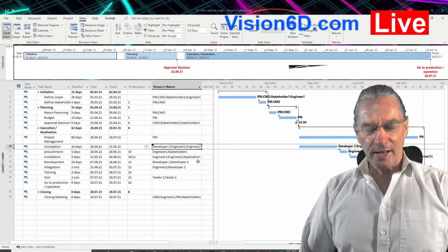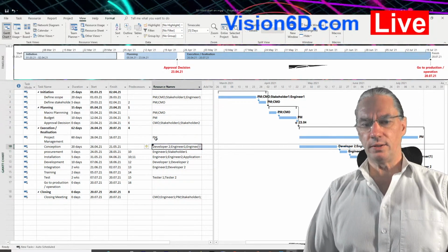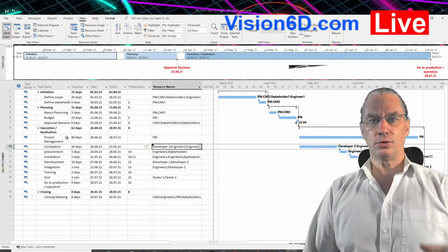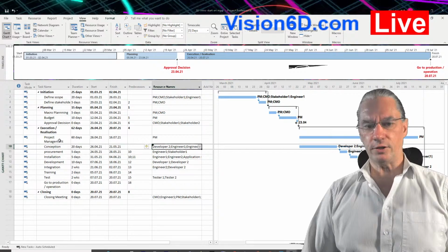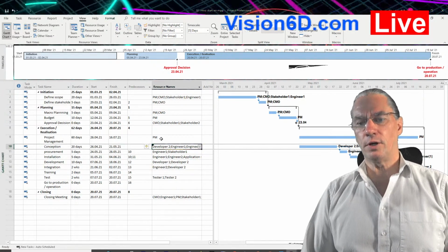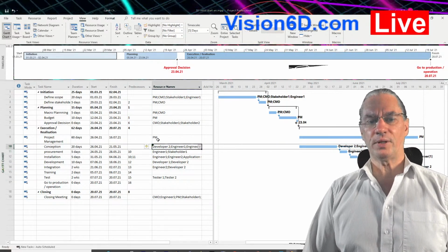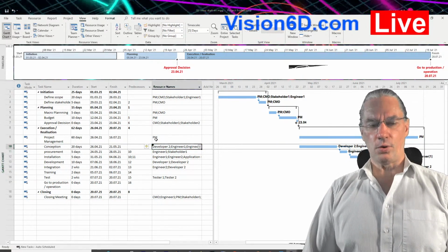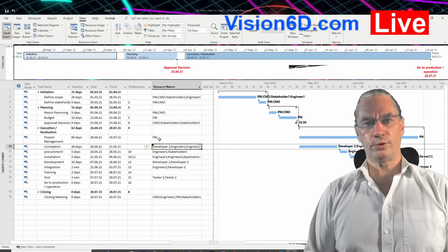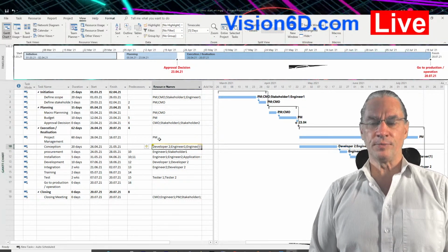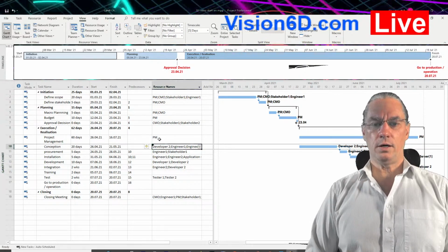So now what I want to say is that the project manager, with the task he is going to do here, that set of tasks which are project management, he maybe is not working 100% all the time during the execution here. So for this, let's admit that this project manager, for the project management tasks, is maybe taking his time 1 day a week.